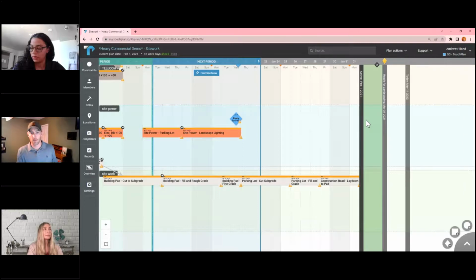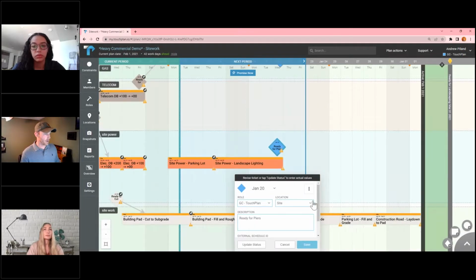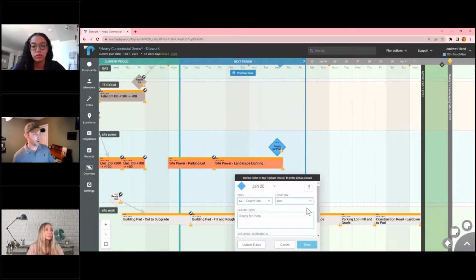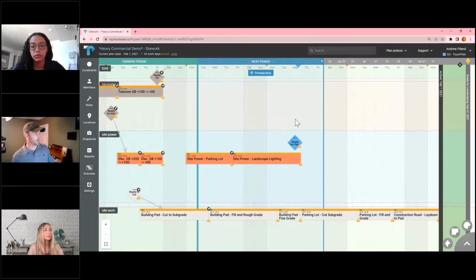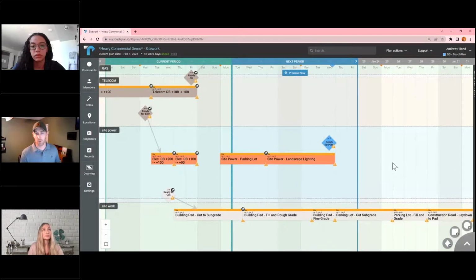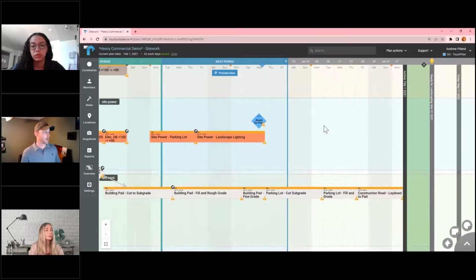So to answer that question, our milestones feature is something that not only lives within TouchPlan, but it's something you can upload back into P6 and sort of align your TouchPlan with your master schedule. It really gives you just a solid idea of where you're planning versus what your P6 is telling you you should be doing. Now, what I have here, I've got a milestone that I set in this demo environment. I said ready for piers, right? We're doing site work before we're ready to start drilling piers for a structural foundation.